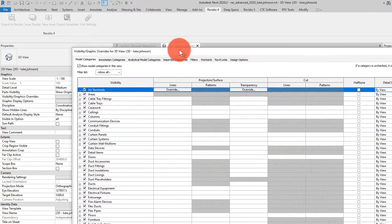Let's demonstrate the other direction. Assume we are doing some reviews in the Revit environment — perhaps there is an issue with this roof. In Revit you can select some elements and use the selection box option to section around those elements. From Revit, we go to the Revisto 4 ribbon and click New Issue. On the Revisto side, a snapshot has been taken and we can use Revisto markup tools on that snapshot. When we click Done, we see a new issue in the issue tracker. Clicking on 3D, we can view that same issue in the Revisto 3D environment. So the switchback functions work from Revit to Revisto or vice versa.